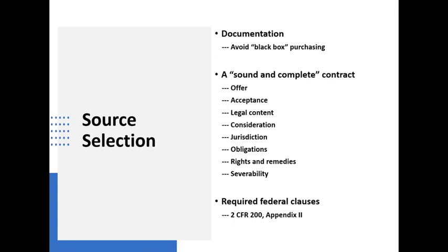In other words, putting into your purchase order document or into a formal contract text that says that the clauses contained in Appendix Roman numeral 2 of 2 CFR 200 are hereby adopted. The contractor is on notice that that's something they need to be aware of. You have no responsibility for providing them with technical assistance about what they're getting themselves involved in. They're big kids and they can handle it, we hope.